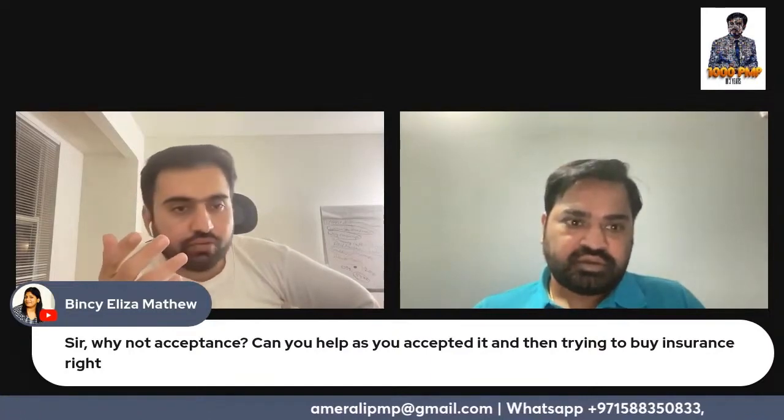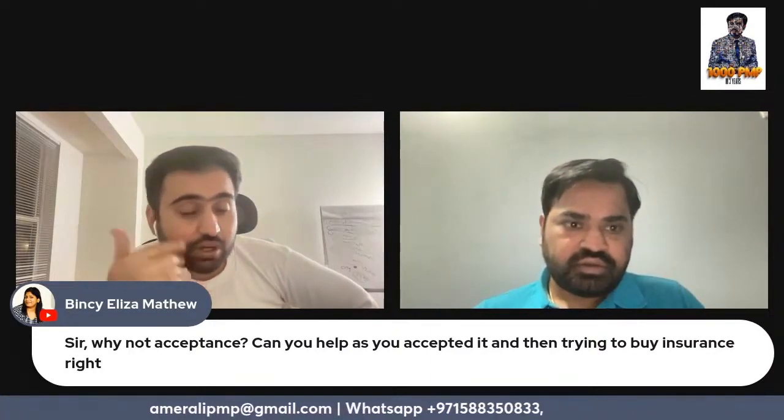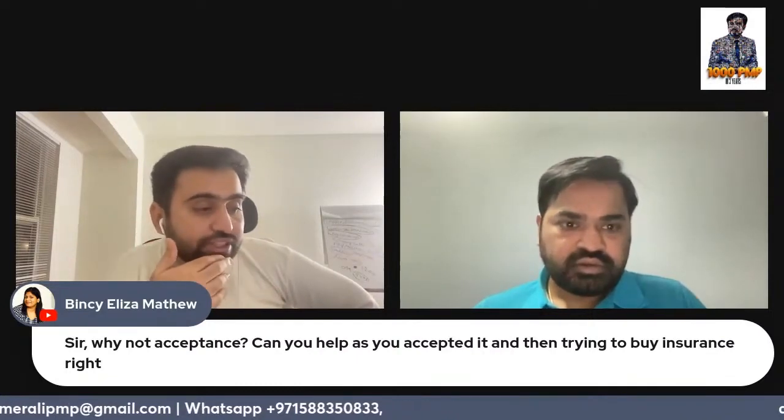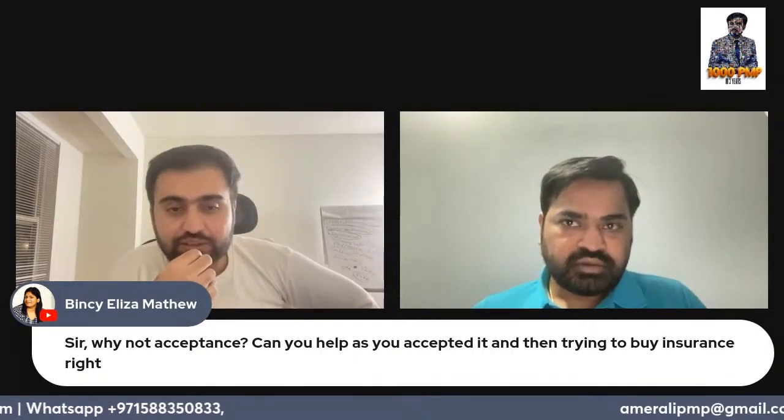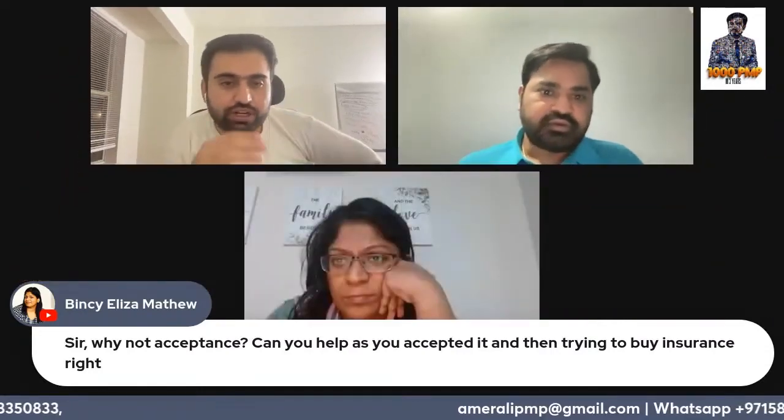Okay, one more point from my side regarding acceptance. In order to have acceptance, you should not take any action. You have actively identified it and worked into that way. Vinci, why do you think it's acceptance? So here they have accepted it, right? He understood that a risk is going to happen, and he is accepting it, and that's why he wanted to buy insurance. Okay, let me ask you what is acceptance. There are two types of acceptance: active acceptance and passive acceptance. And acceptance is always for a reactive risk strategy, not a proactive risk strategy.